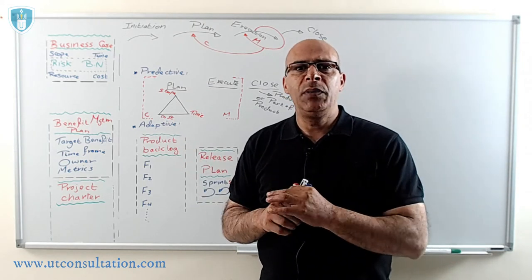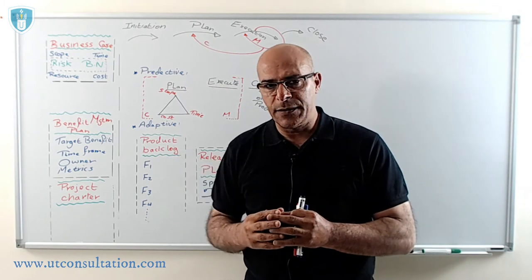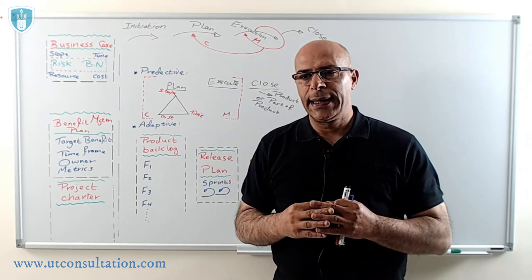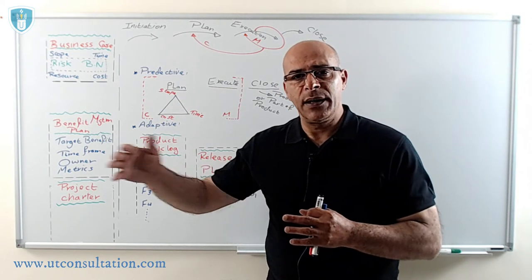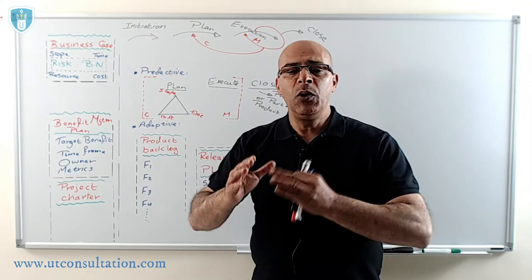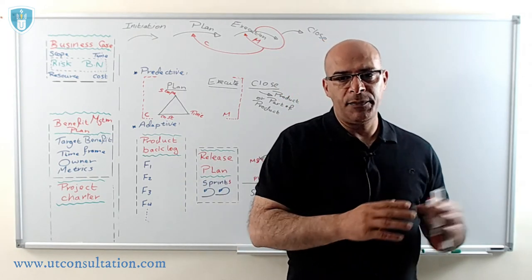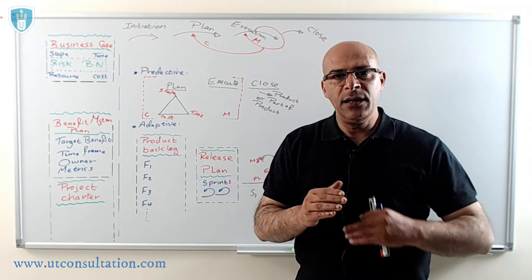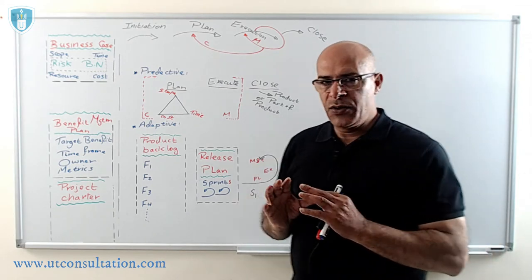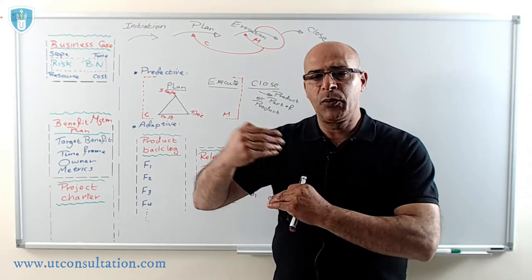What matters to us is the product, not the project — ultimately we care about the product. In the adaptive approach, the product is not fully defined upfront, and this may be the reason for high frequency of change requests. Requirements are evolving, not clear or agreed upon like in predictive. In this case, there is no full upfront planning before execution — planning goes through stages called progressive elaboration: plan, execute, plan, execute, until we arrive at the product. The first key template used is the product backlog. The product backlog is a document that comes after the project charter and before what is known as release planning.